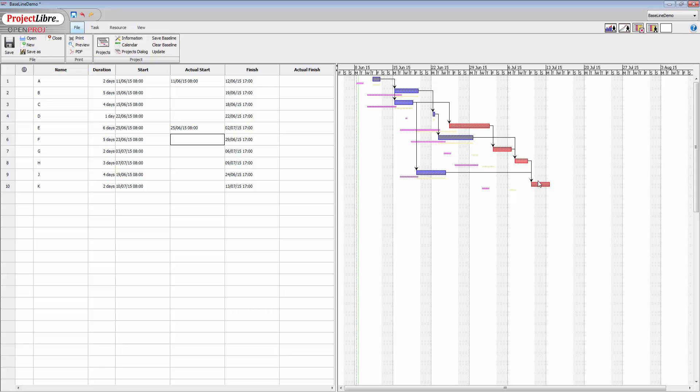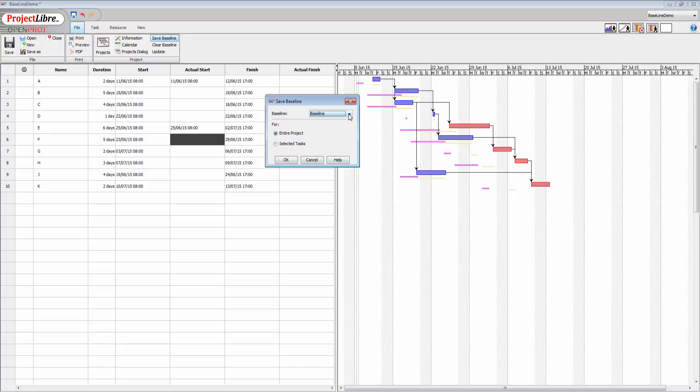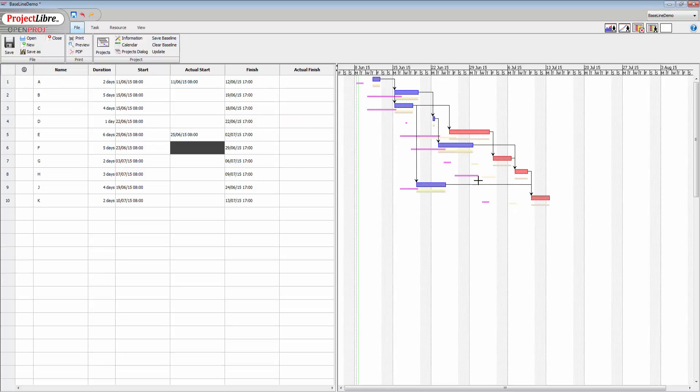And again, you'll see that this portion of the project has actually been affected. So we can see all the cumulative effects of the various changes. So I'm going to save this baseline as baseline 3, let's keep in, there we go.